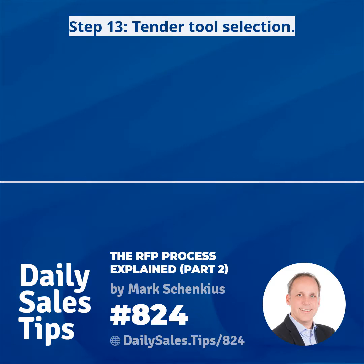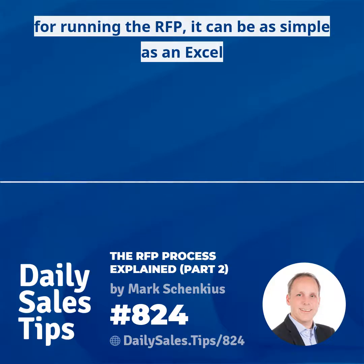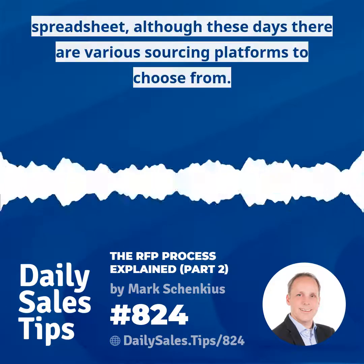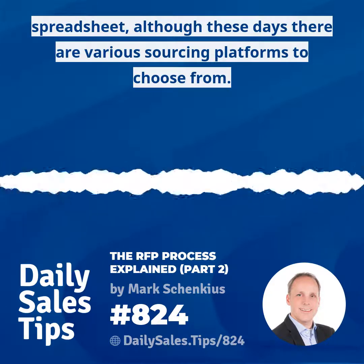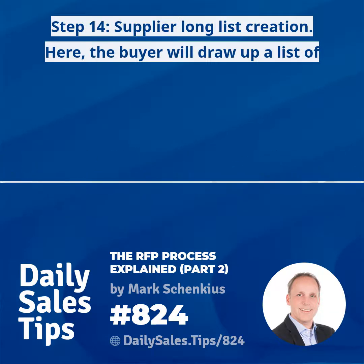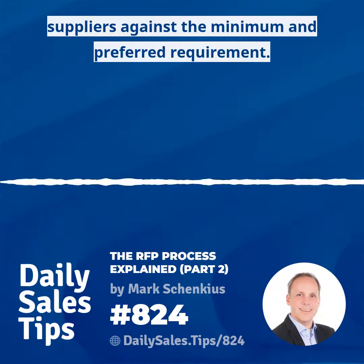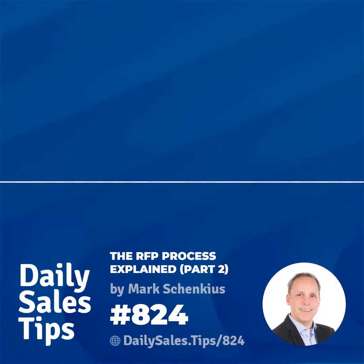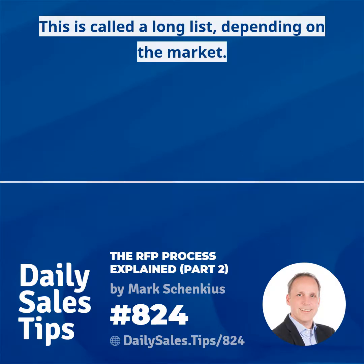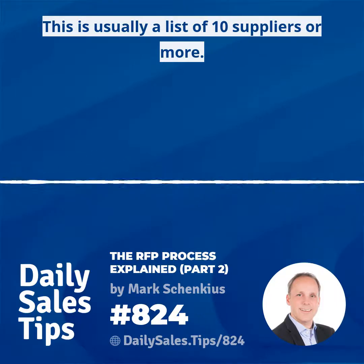Step 13. Tender tool selection. At this stage, buyers will select a tool for running the RFP. It can be as simple as an Excel spreadsheet, although these days there are various e-sourcing platforms to choose from. Step 14. Supplier long list creation. Here, the buyer will draw up a list of suppliers against the minimum and preferred requirement. This is called a long list. Depending on the market, this is usually a list of 10 suppliers or more.